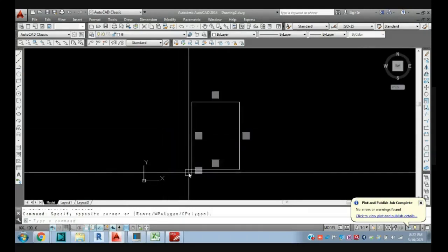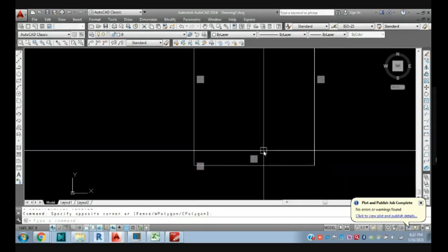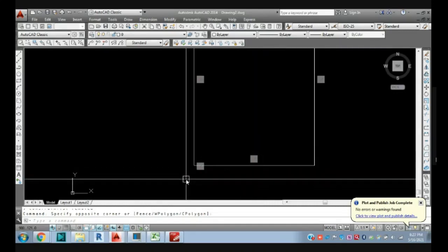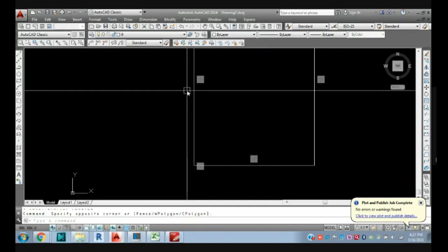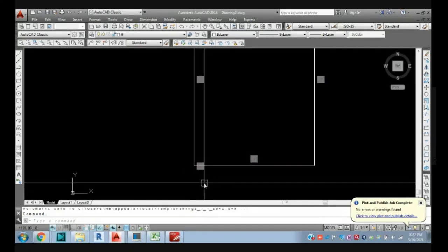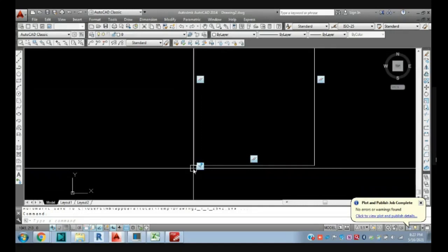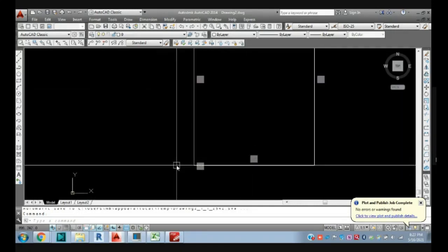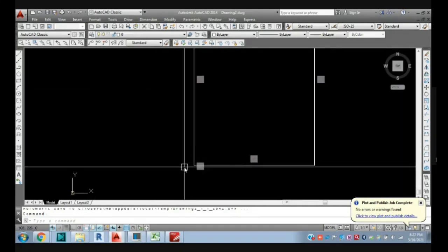So we need to set this corner or any corner. When we start the project, all those things are discussed in the kickoff meeting, right? The mechanical person, electrical person, and project coordinator will sit together and finalize it, or they have some manual, saying our building corner is at 0 comma 0, and on the basis of that all people do the work.